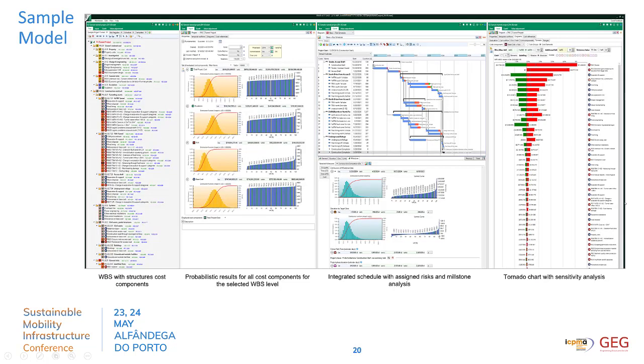The last screenshot gives us a big picture of such a model. On the left part here you see the WBS structure with all components, base cost components in blue, the red are separate single risks. Then the second part shows the results for the total project, a tunneling project in this case, total cost with the uncertainty, escalation, risk, aggregated, and the base cost. The third part is the schedule view as you have seen before, our risk-loaded schedule with all risk in here and information to our completion date in a range down here, and also the delay which might be caused by risk impact.